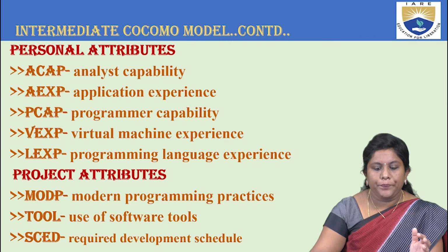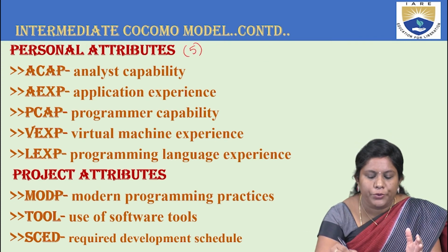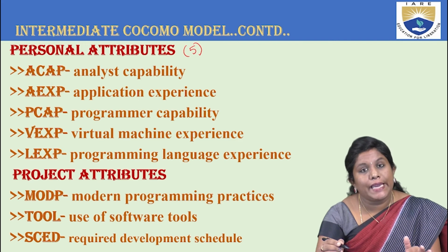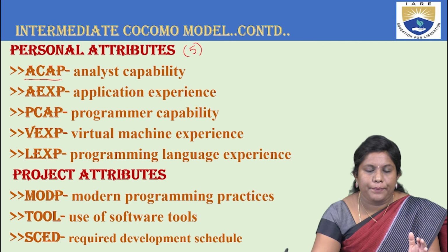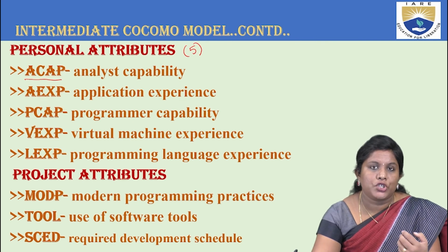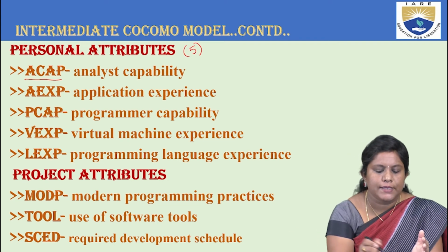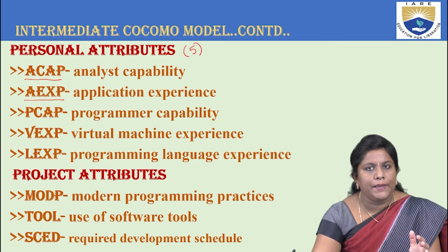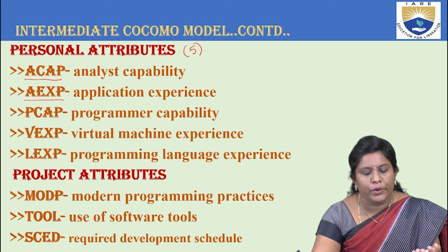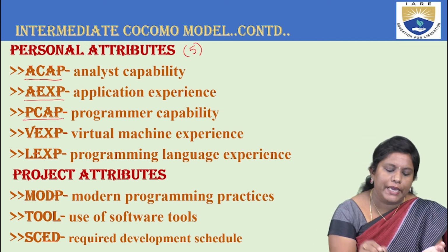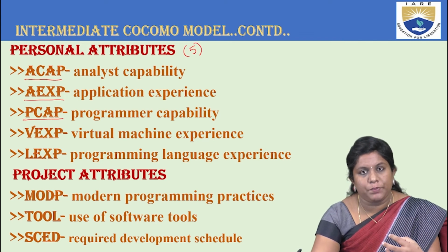So, moving further, you have personal attributes that are 5 in number, as I told you. The first one is the capability of the analyst. In short, it is written as ACAP, capability of the analyst. How much can he deliver us the things? Next one is the application experience. In short, AEXP, application experience. And then we have the capability of a programmer. So, programmer capability, PCAP.